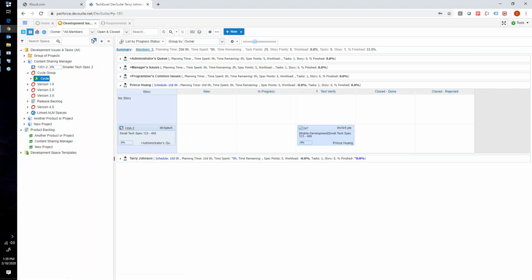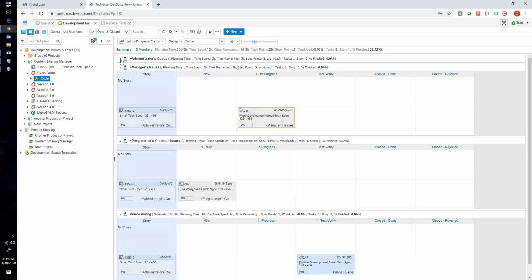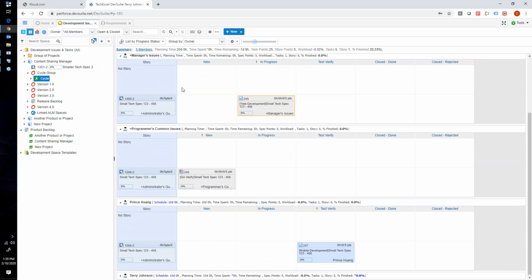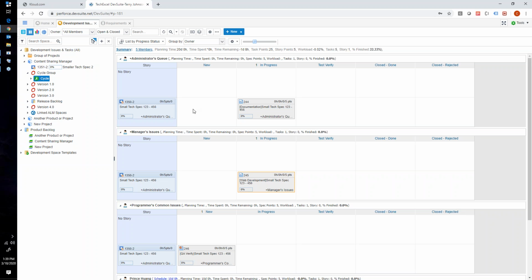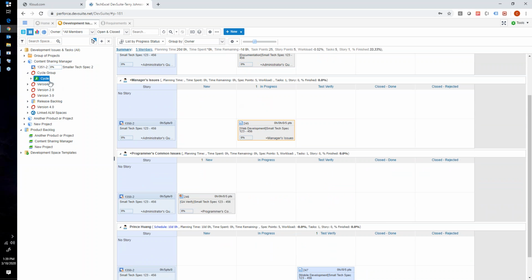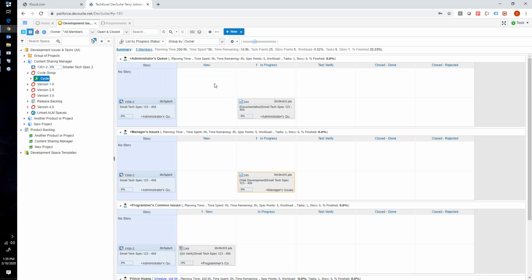If I do it by owners too, you can actually set WIP limits per person. So for myself here, for anyone actually, I'm going to set the WIP limit to be 1, because at any given time, a person can only do one task, right? So I can do that too. Visually, it'll be really fast for me to see, from a Kanban perspective, if somebody needs to do an item. So it's very agile. It's not time-boxed, but it's kind of that assembly line sort of thing.